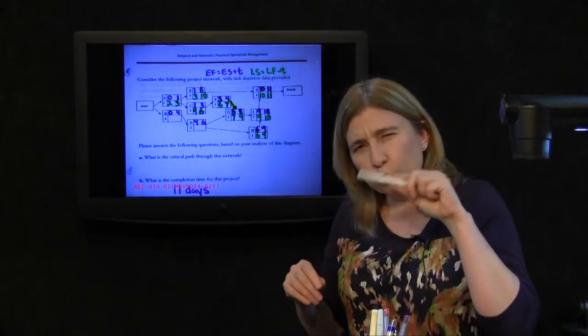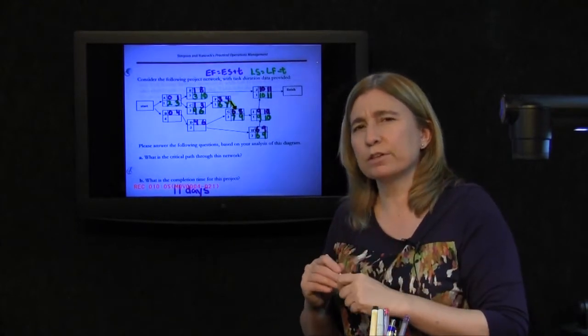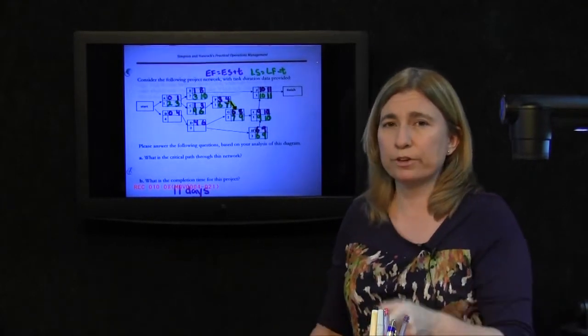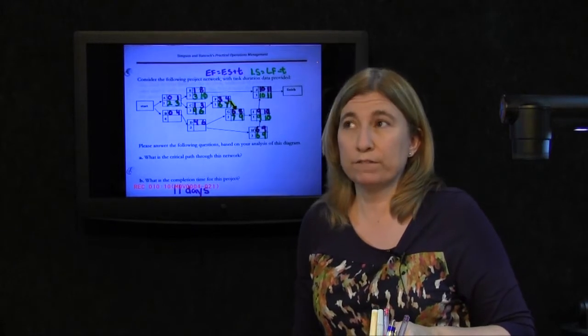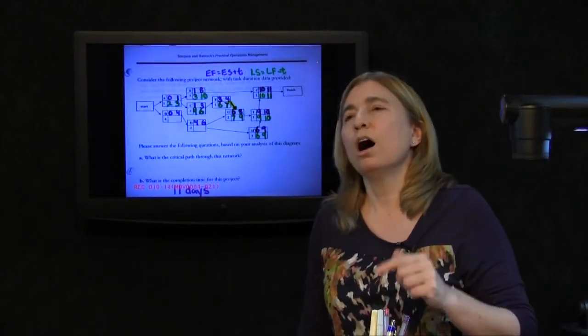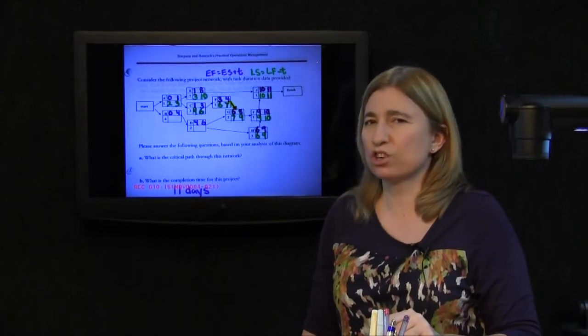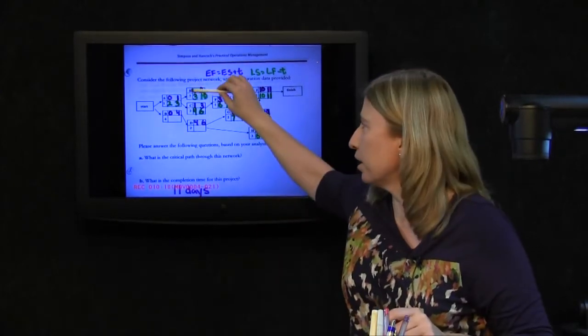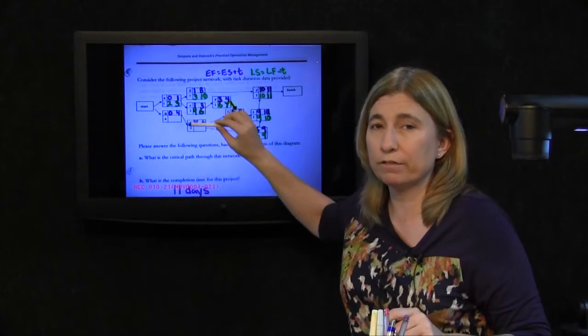Now, that reasoning that we did to get the late finish time for A, that's known as the late finish time rule. The late finish time for an activity is equal to the smallest of all the late start times of the activities that immediately follow it.